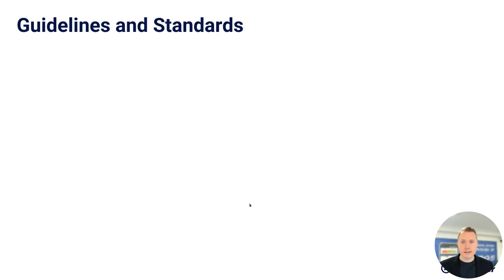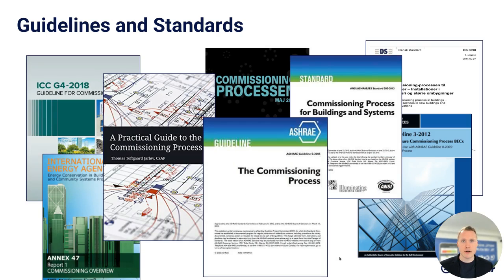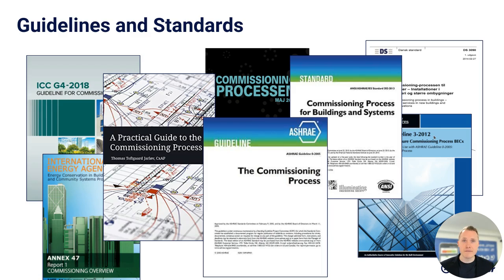Regarding the guidelines and standards, just a couple of them are available around the Internet, and most of them are paid guidelines. The main elements when we talk about commissioning globally are the ASHRAE Guideline and the ASHRAE Standard. There are also a lot of different sub-guidelines and standards for different regions and different states in the U.S. Some guidelines focus on different aspects — for example, the NIBS Guideline 3, which is for Building Envelope Commissioning. You can find links to all of them on our Commissioning 101 page.